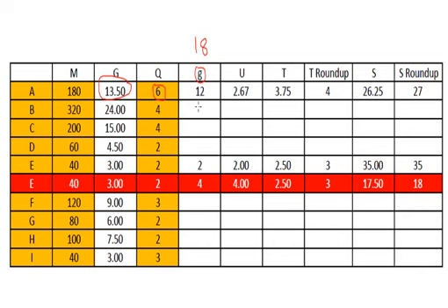Alright, so most of these ones are really simple. There you can see 24, that's a simple one, so we can use 6 teams over there, for instance. The next one over there is 15. We've got team sizes of 4, so if we use 4 teams, we'll get out to 16 over here, which isn't too bad. You just don't want to waste too many resource hours on that. Alright, so if it's just 1 or 2 over, that's fine. If it's getting upwards of 4 or 5 over, that's a little bit much, so rather rationalize on that.